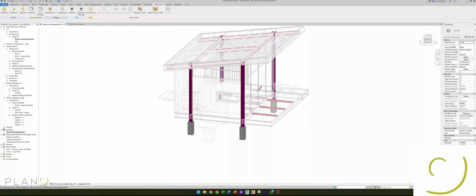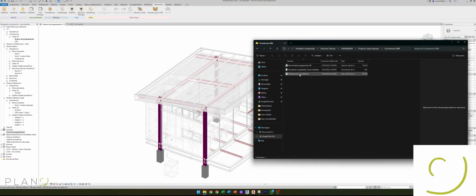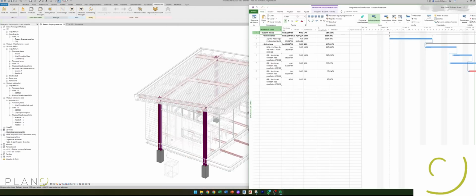So let's assume we are in a new week. We open the project, click on keep my links, and then click on that IPA 200 that was ahead. Ahead work is one where the completed work is above what was planned, meaning we have a negative 16% delay, meaning it's ahead. We'll tell this one that it is delayed, something strange. Look, a 30% delay to the pedestals that were finished and are no longer finished. And we tell the columns that we have already done them, that they are 100% finished.